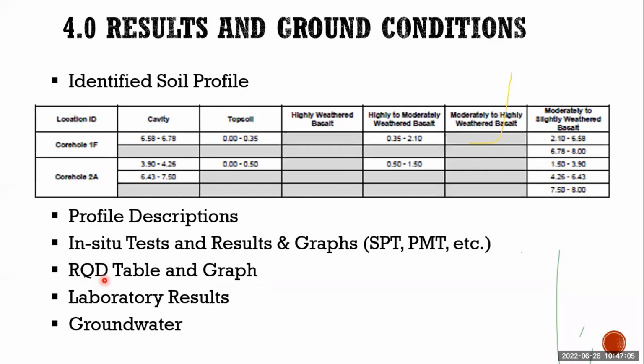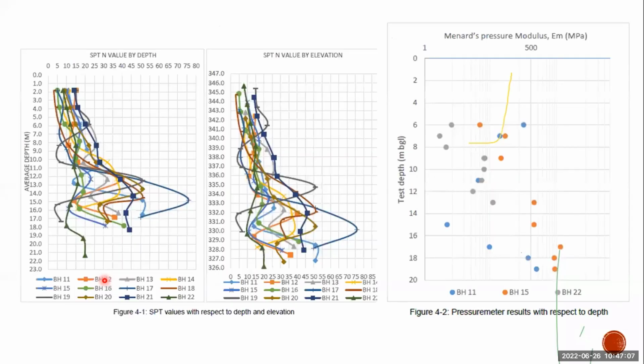Next slide, Karthik. Yes, I'm just showing a template here. We indicate the SPT values with respect to the depth. We have different core holes here, and you can see how the SPT blows vary with depth. The second graph is SPT value with elevations.